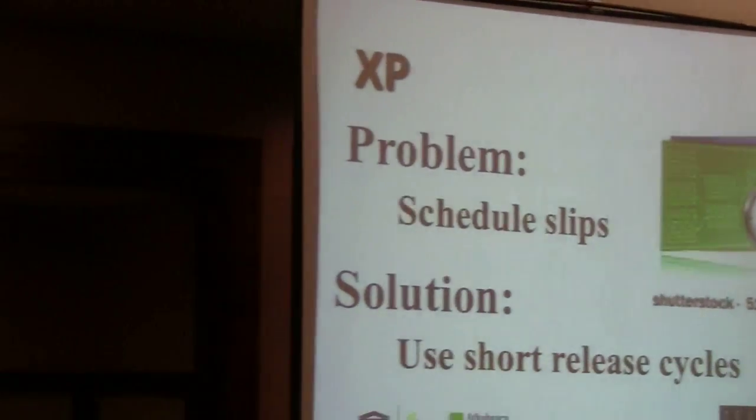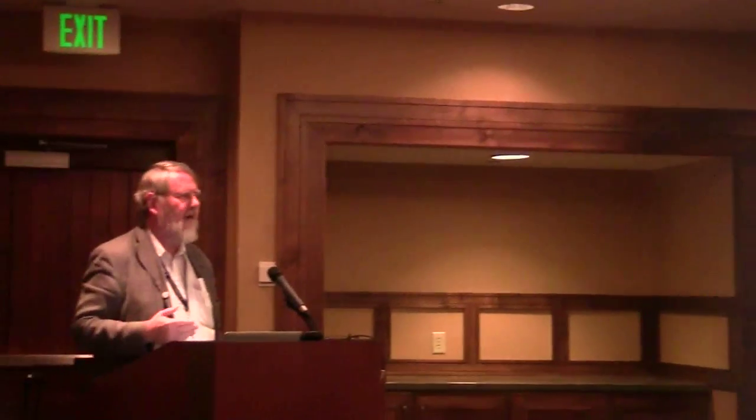Why would your schedule slip? It means you're trying to do too much in too little time — maybe you can do less. A project gets cancelled? The solution: the smallest release that makes sense. If you're working on a project and the funding ends, if you've done it iteratively, you'll have something that works. You won't have to throw it away, because you've been doing it in short iterations.